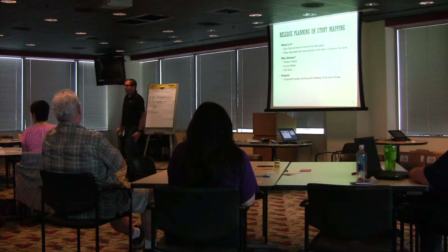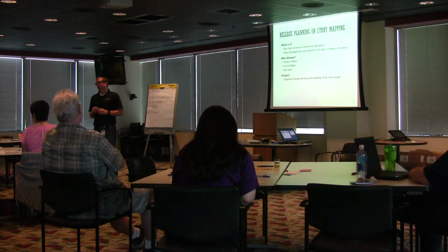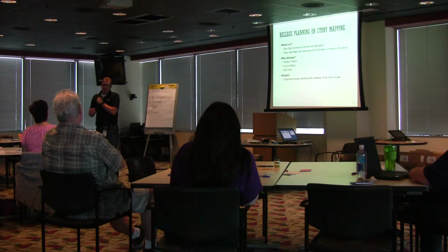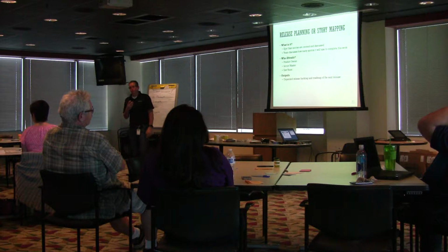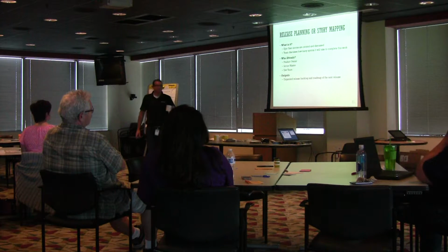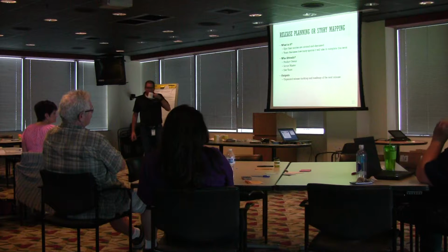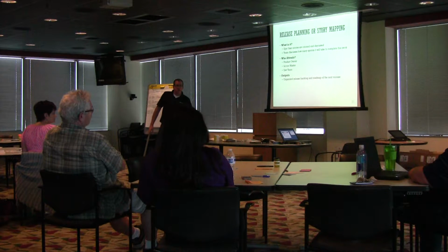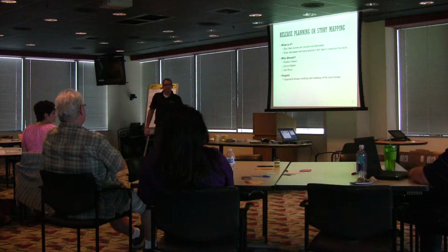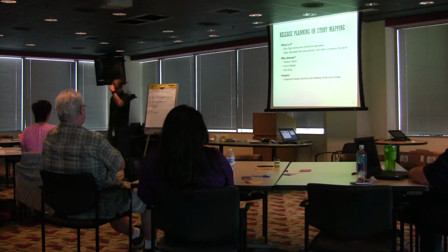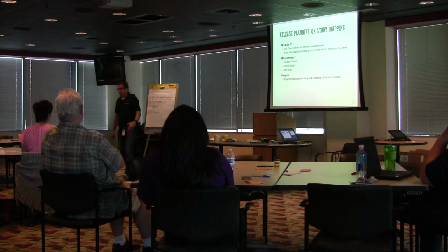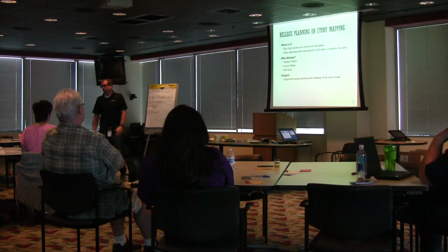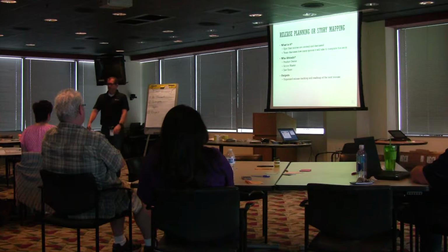Or it could maybe be an issue that was identified. I'm at a loss for examples, but maybe like a login page, right? And user can log in. That might be an epic, and then there's lots of stuff that you break down out of that, right? You need to be able to talk to the database, bring it back. You need your style sheets. You need your buttons. Well, what if I forget my password, right? What rules should be applied if I fat finger it? How many times do I lock it out? Those types of things. So start breaking it down into smaller features.